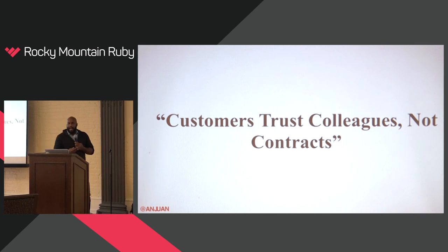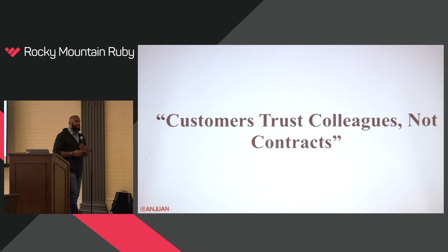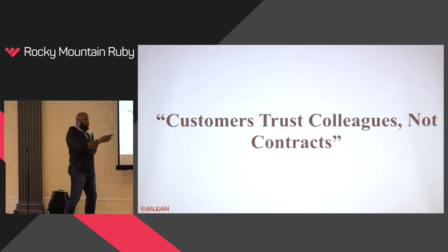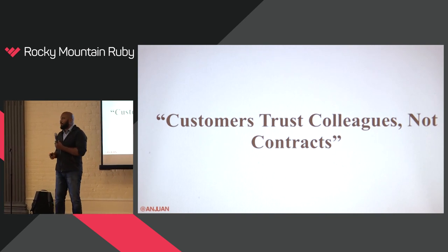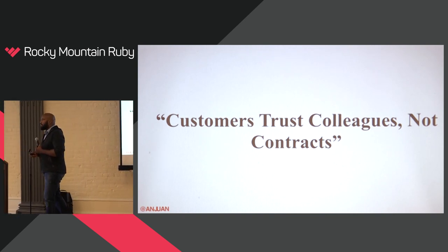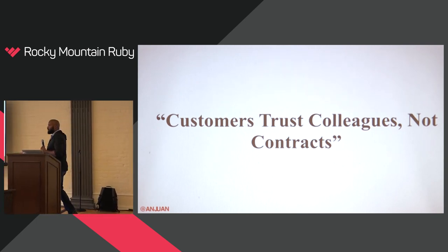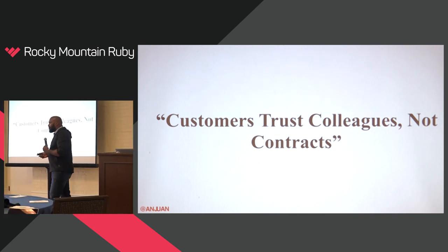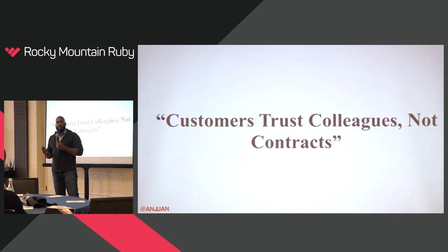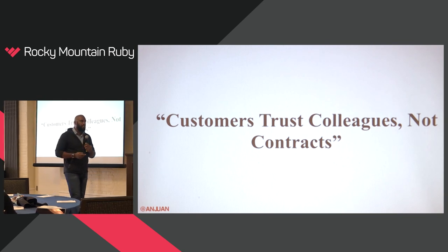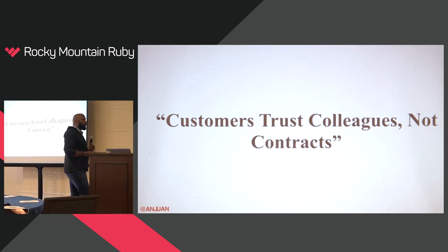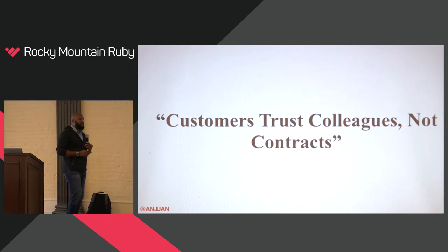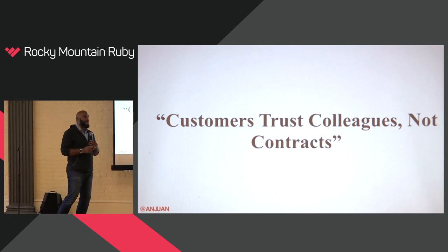The way that I learned this is that I was working with an outside company to build an interface between our product and their product. We began to try to work separately, where my team would work on the feature, and then we would have a weekly call, and then they would show what they had been working on. And we kept on diverging, because they were missing fields in the interface or there was something wrong with their code. And I was like, well, wait a minute. We're operating as two teams separated by companies. Let's create one team that spans both companies.